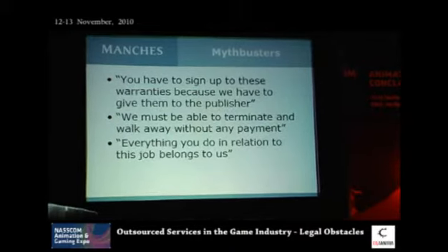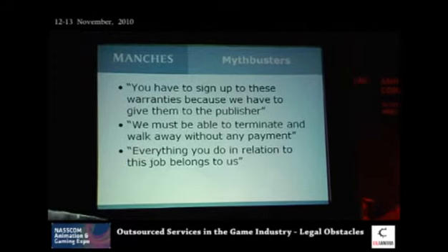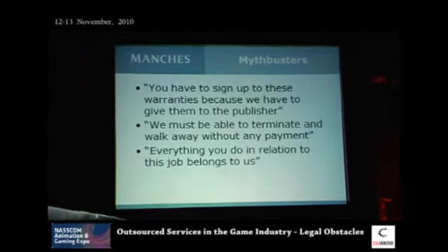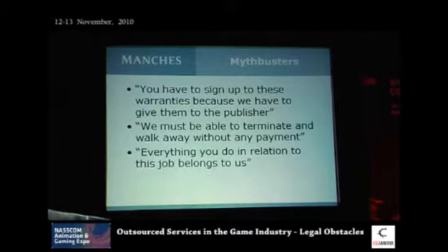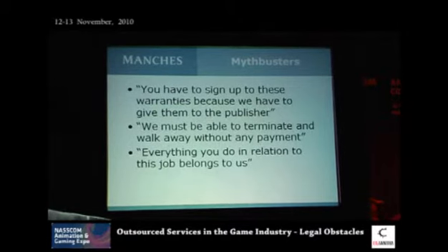The client often says, we must be able to terminate and walk away. No. Even if you agree that your client can terminate any time, fine. Make sure that the contract stipulates that payment has to be made. You must deal with that.